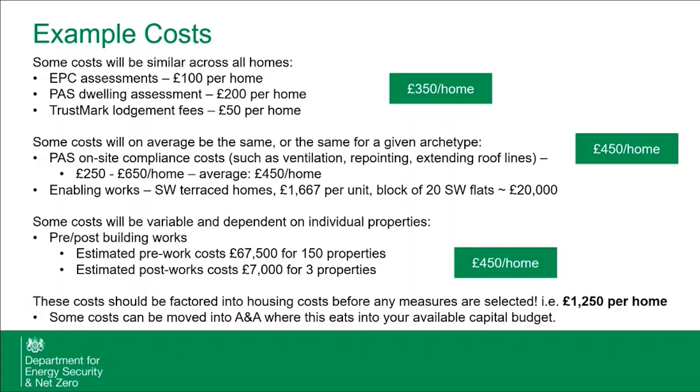What you can do is, at a later point in time, submit a change request where you can edit a previous batch that's been submitted if you choose to alter how you've capitalized certain costs. It's just important that it's consistent across the entire scheme. So if you've capitalized EPCs to date, they always have to be capitalized. Otherwise, you'll need to edit every pre-existing batch. So yeah, entirely up to you, but it should be consistent.